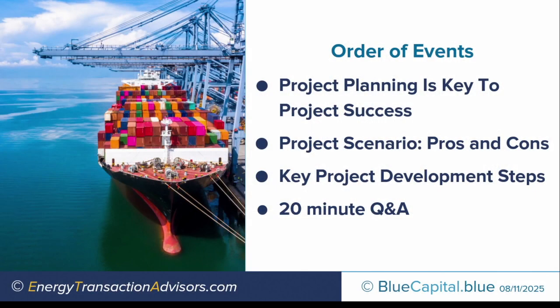The first thing is we're going to talk a little bit about why there's so much importance in project planning, especially at the beginning of a development. A lot of times as developers, we get very excited about what we're doing, we jump into it, and we forget the pre-planning process. The pre-development process is every bit as important as getting to where you're operational. I usually put 2 years into pre-development planning stages. Most developments cost anywhere from $2 to $4 million in pre-development stages. That's just part of my budget when I budget out a project.